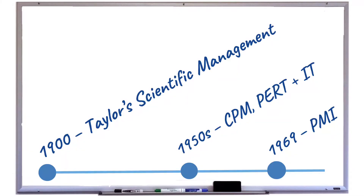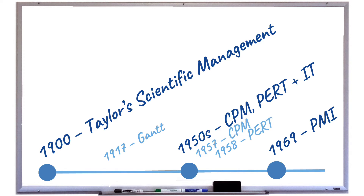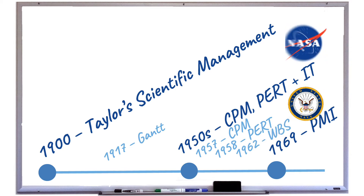The project management methodology as we know it is just an upgraded version of Taylorism, supported by IT and inventions that came after Taylor — like the Gantt chart, critical path method, and program evaluation and review technique, developed roughly in the 1950s — followed by work breakdown structure in 1962, used by the U.S. Navy and later by NASA, which made project management methodology all the more popular.